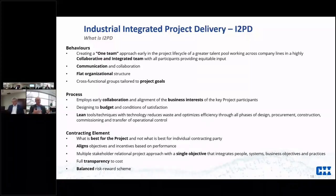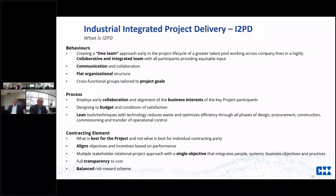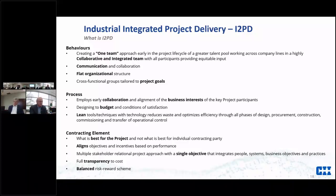You want to set the project goals and values — what does a successful project look like? The process involves early collaboration and also aligns business interests not just within the owner's organization but within the I2PD team as well. Designing to the budget: we're all accustomed to writing a specification, putting it on the street, getting back a fixed price, and building our budgets from those proposals. In this case, we have a budget and we're trying to design — with the objective of meeting specifications — to that budget.